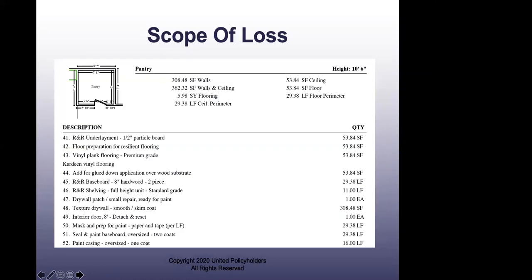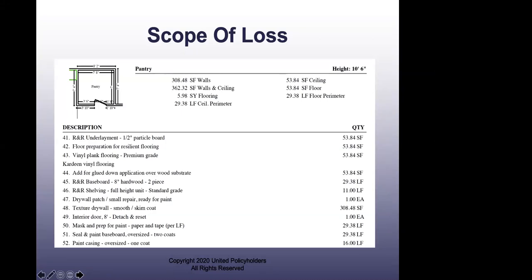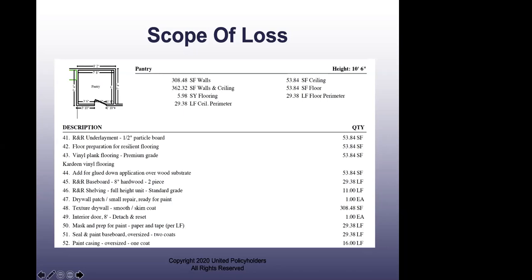And if I could just hop in, sure. I just want to reiterate something that you've already said multiple times, but really has a big impact: the difference in not looking at price first and fixing these items. Just a quick example that resonated with me is plaster walls, about $8 per unit to replace, versus sheetrock, which lands somewhere just under $2 in one of the estimates I looked at. That's 4 times different from just changing one aspect of an estimate, that is easily tens of thousands of dollars depending on the size of the house.